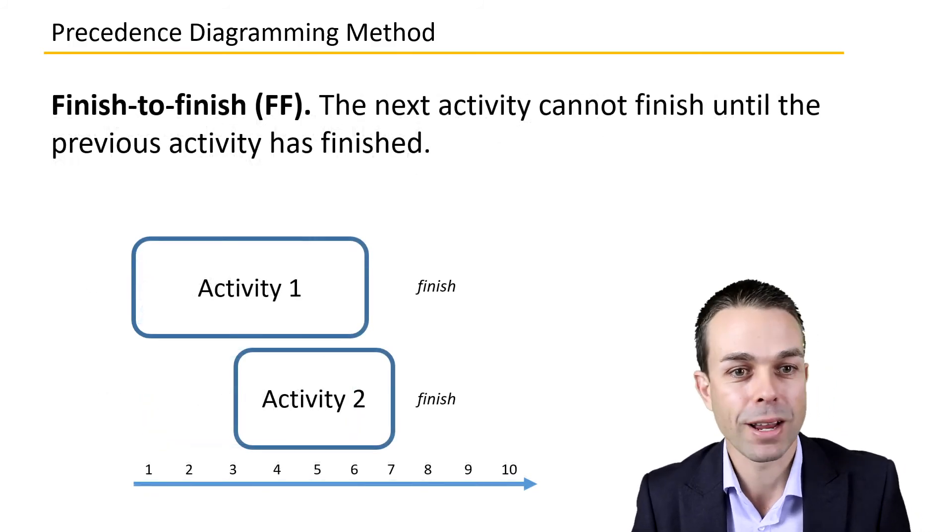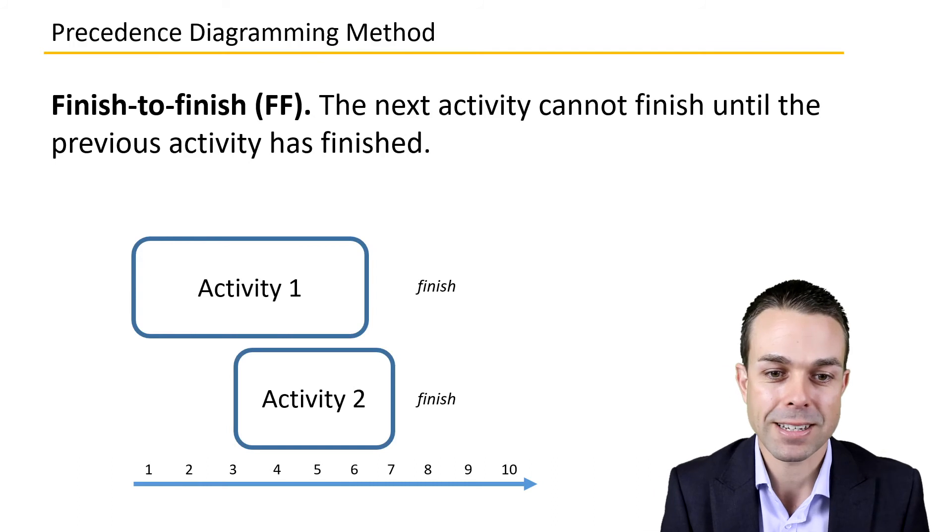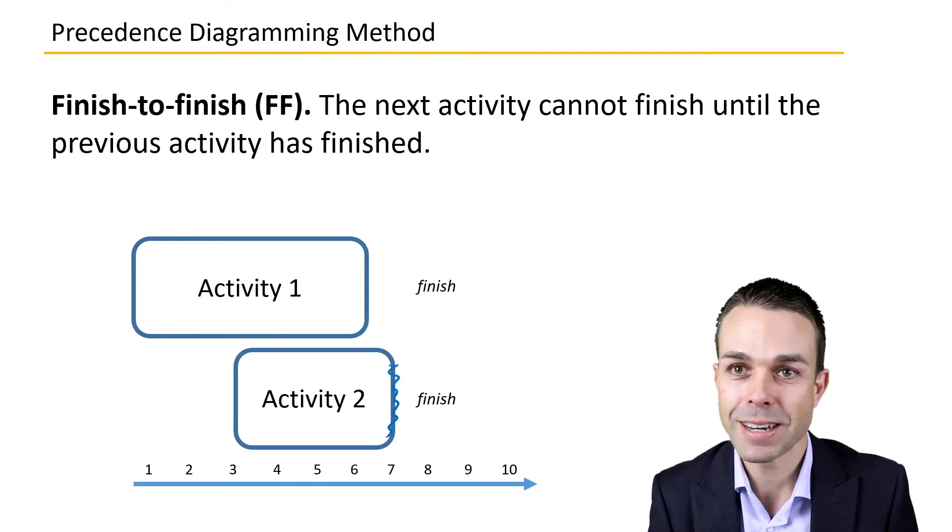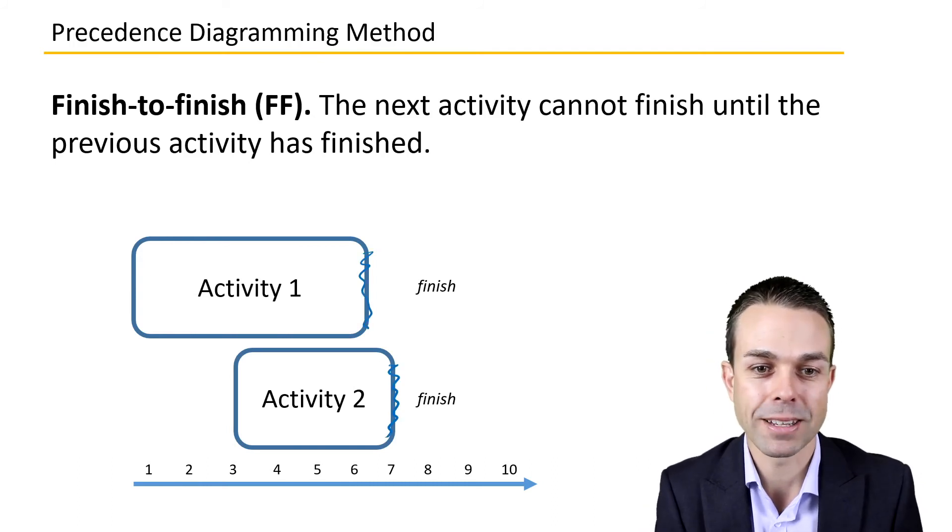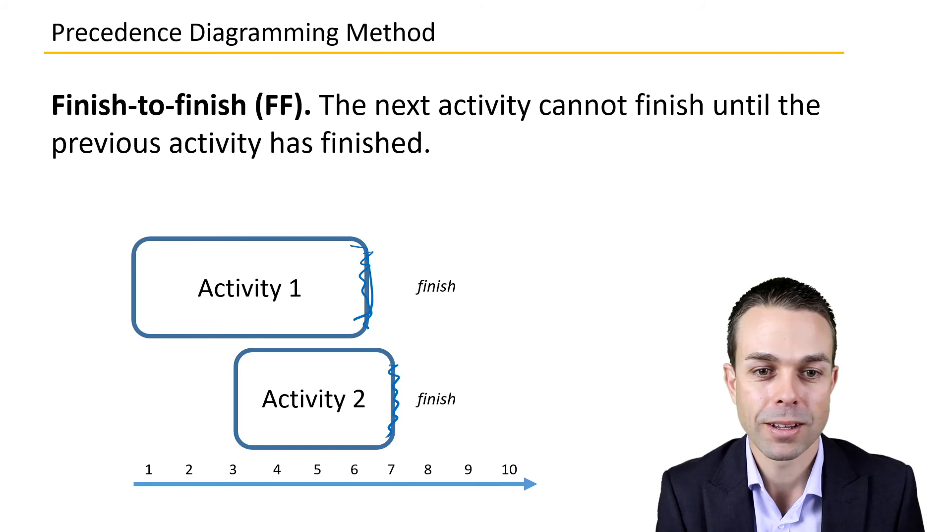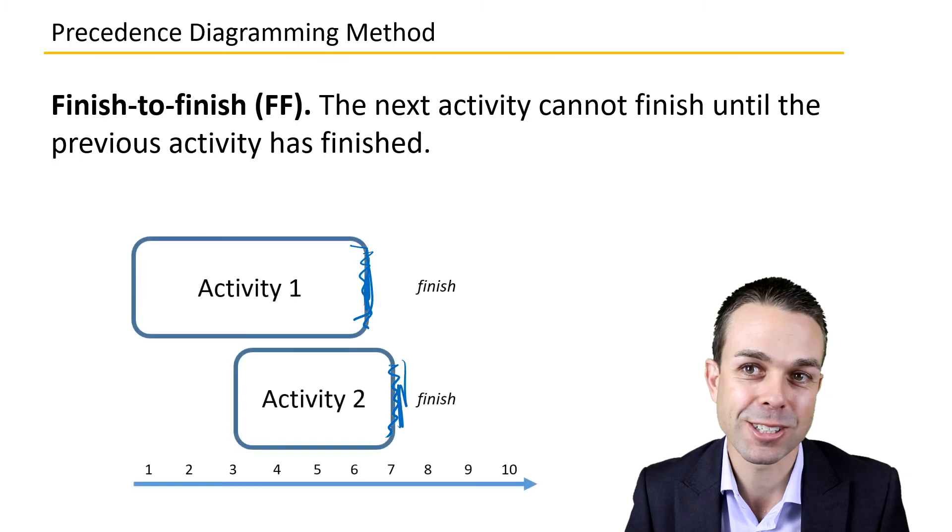Then we have finish-to-finish, where the next activity cannot finish until the first activity has finished. This activity is dependent on the first activity finishing.